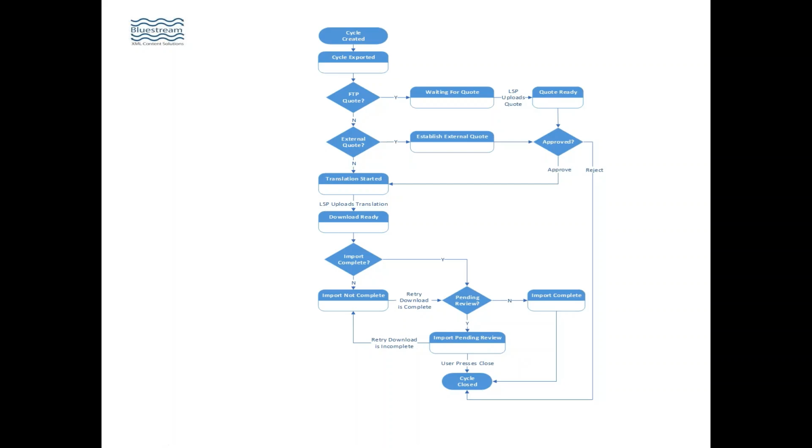In other words, you send out the English and ask for French, send out the English and ask for Russian. The reason it's good to separate them is the French might come back or the German might come back early, and the Russian takes forever. There are advantages in getting the French back early.